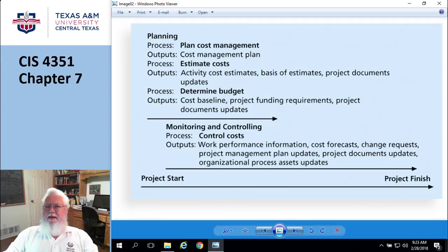And basically, if I'm staying within my contingency funds, we'll talk about the thresholds, like plus or minus 10% or whatever it is, if I stay within my threshold, I basically don't have to go back to, Mother, may I have some more money, kind of a thing. In the software world, we're talking about sudden employee turnover or things like that, or mergers and acquisitions.